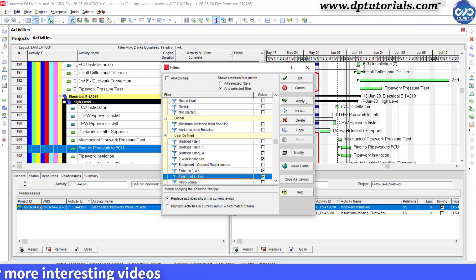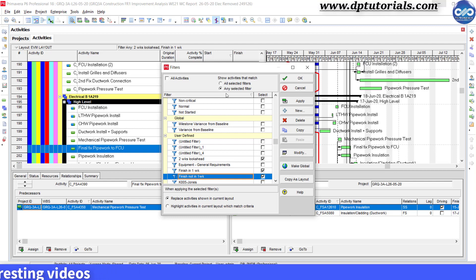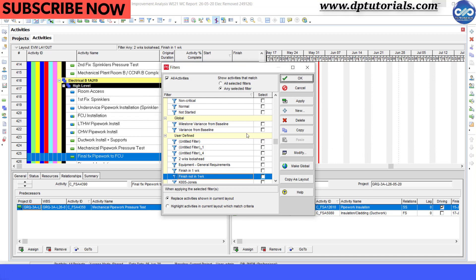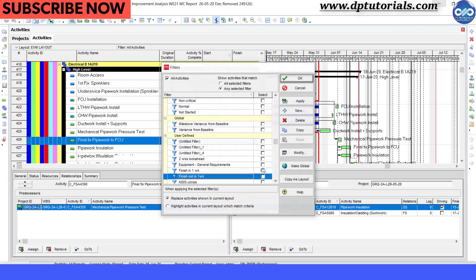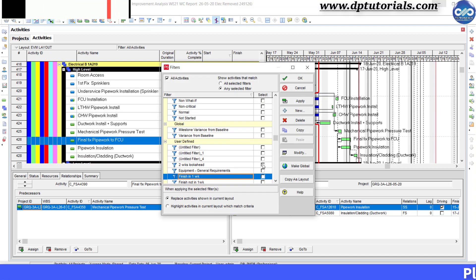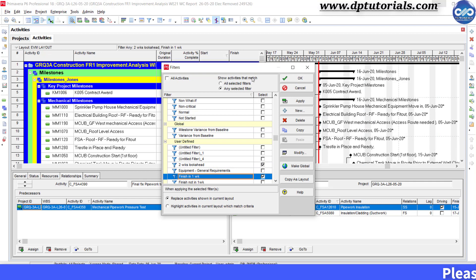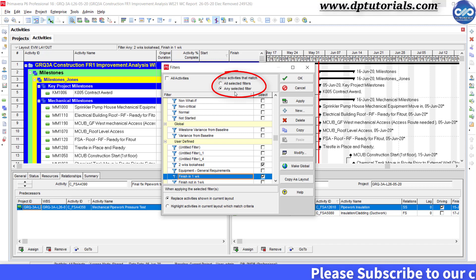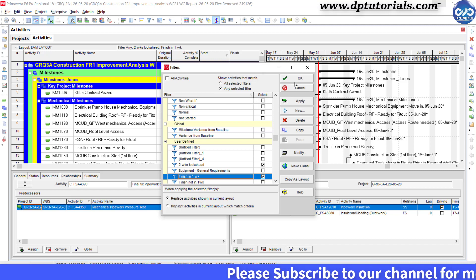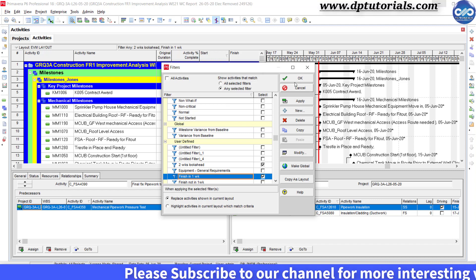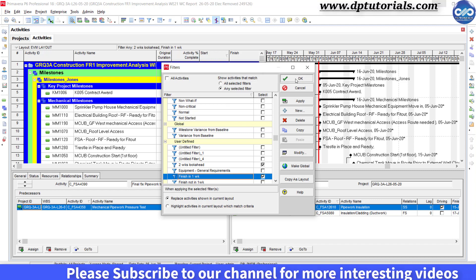Now let us perform for the final output. Remove all filters. Select the only two filters, two weeks lookahead and finish in one week filter. Remember to select the option show activities that match any selected filters in the top portion and click OK.